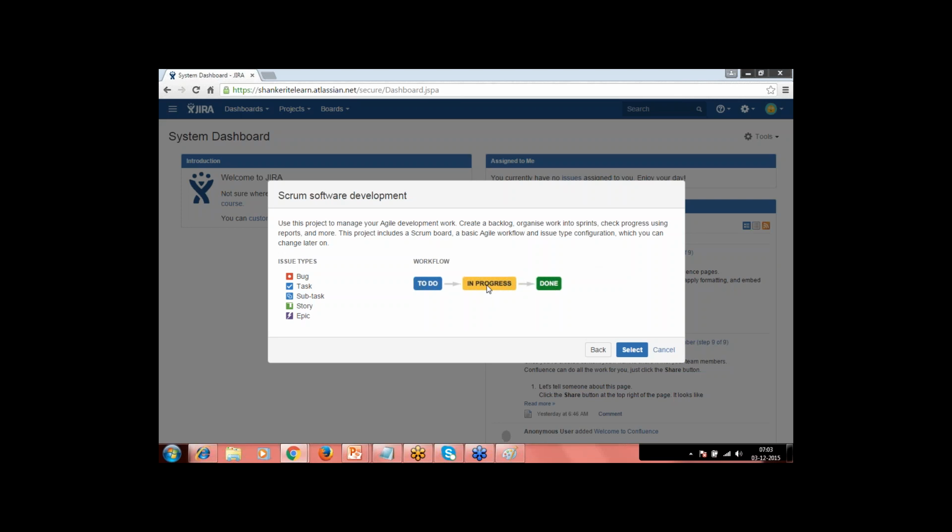let's say a developer has to create some screen. That is a task for him. But creation of a screen, he or she feels cannot be done in the same day. And logically, there are two sub features, for example. Then he or she can go ahead and create two subtasks in that.